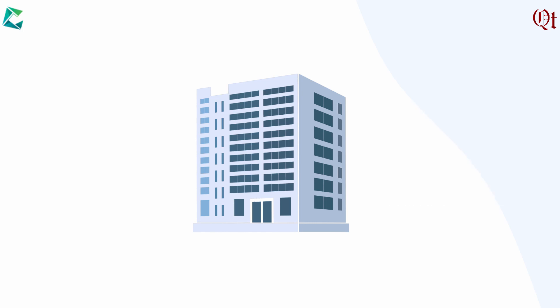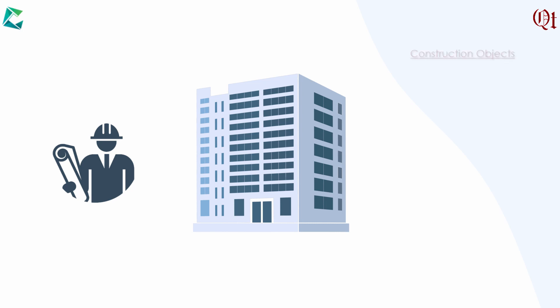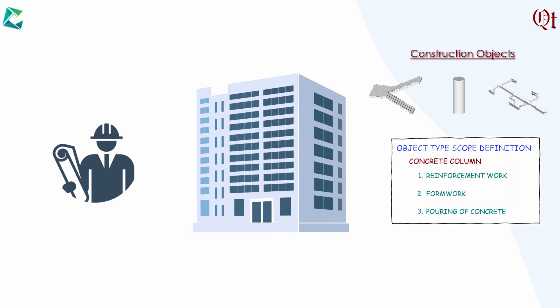BIM models are created based on design. In order to use these BIM models in construction, break down a project into constructible and measurable units called construction objects, and then define the scope of each object.